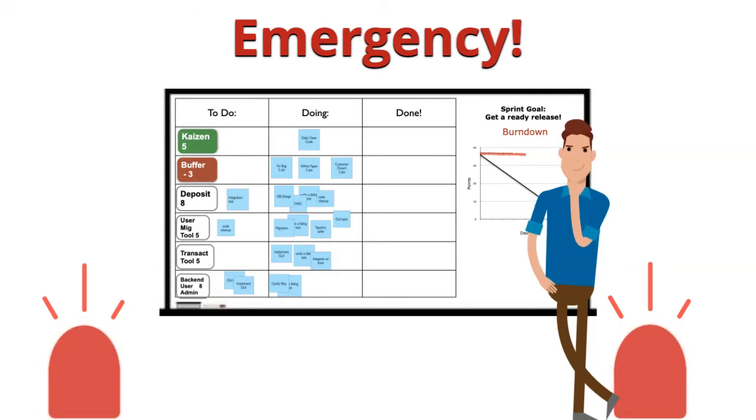If the burndown line is not tracking downwards by mid-sprint, the team needs to quickly implement the emergency procedure pattern. This is an ideal time for the Scrum Master to help the team to act early rather than the team drift towards sprint failure.